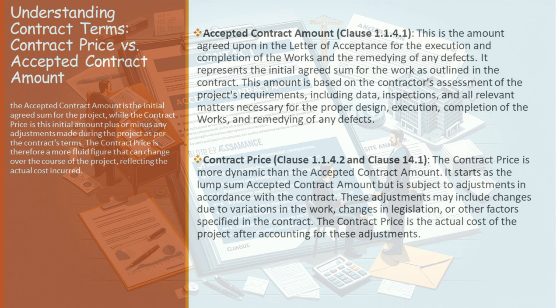Think of the contract price as a living entity within your project. It evolves, reflecting the actual cost incurred as the project moves forward. This is crucial because it means that the final amount paid might be different from what was initially agreed upon. It's a figure that adapts to the realities of the project, ensuring that all parties are fairly compensated for the actual work done and expenses incurred.